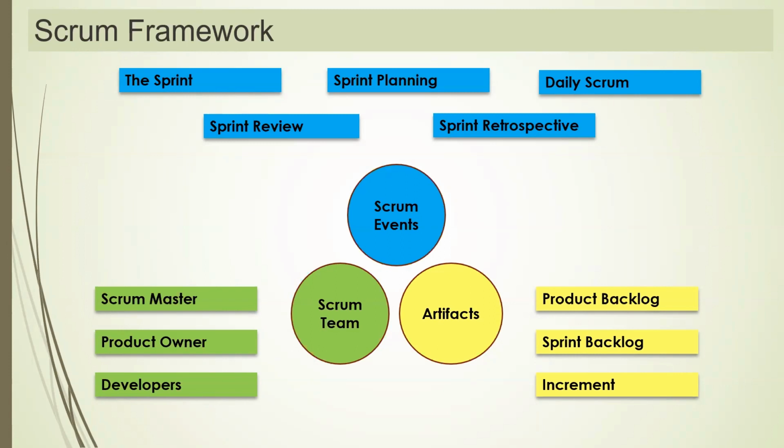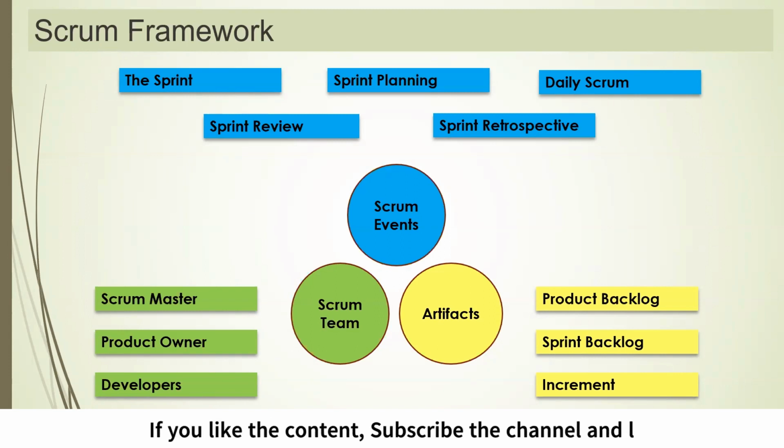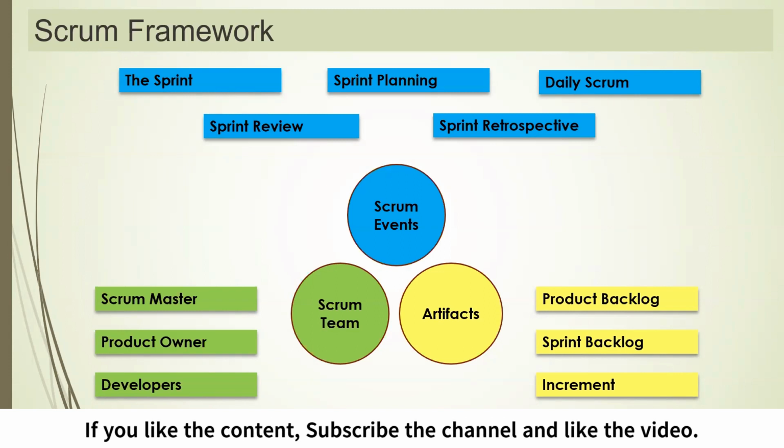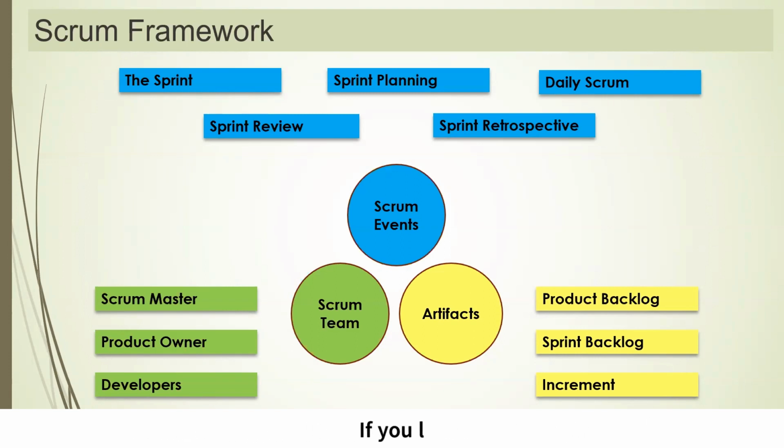So it is up to us when we are deciding the team and starting the development. The Scrum team can decide which iteration length they want to go for. They can set 1 week, 2 weeks, 3 weeks, or 4 weeks. So Scrum allows 1 to 4 weeks.